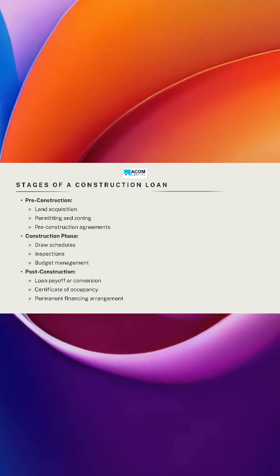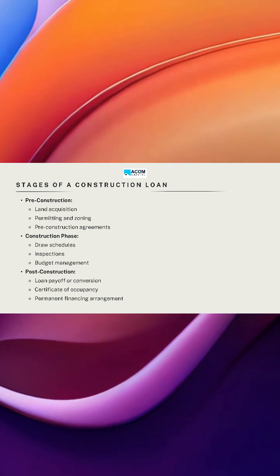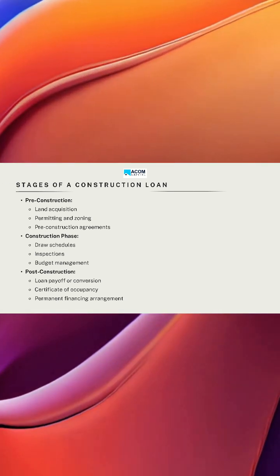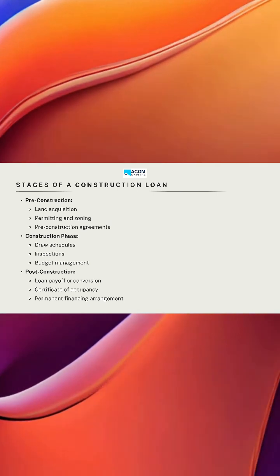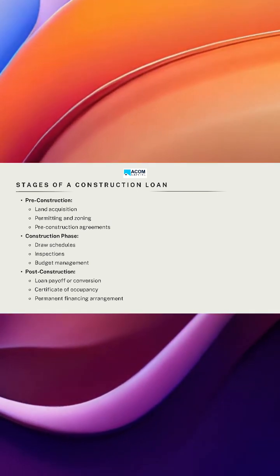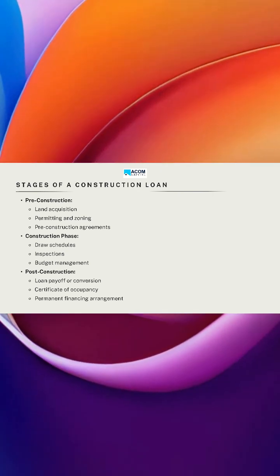The construction phase. During the construction, you have draw schedules. Lenders do inspections of the construction progress and budget management. Post construction is loan payoff or conversion.